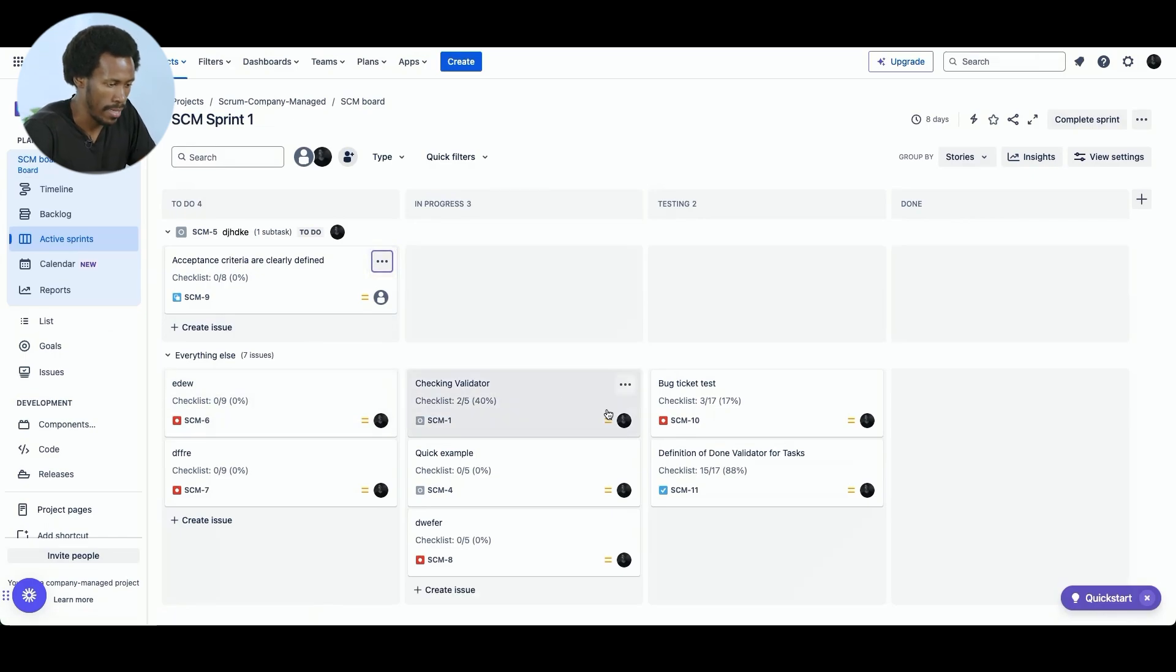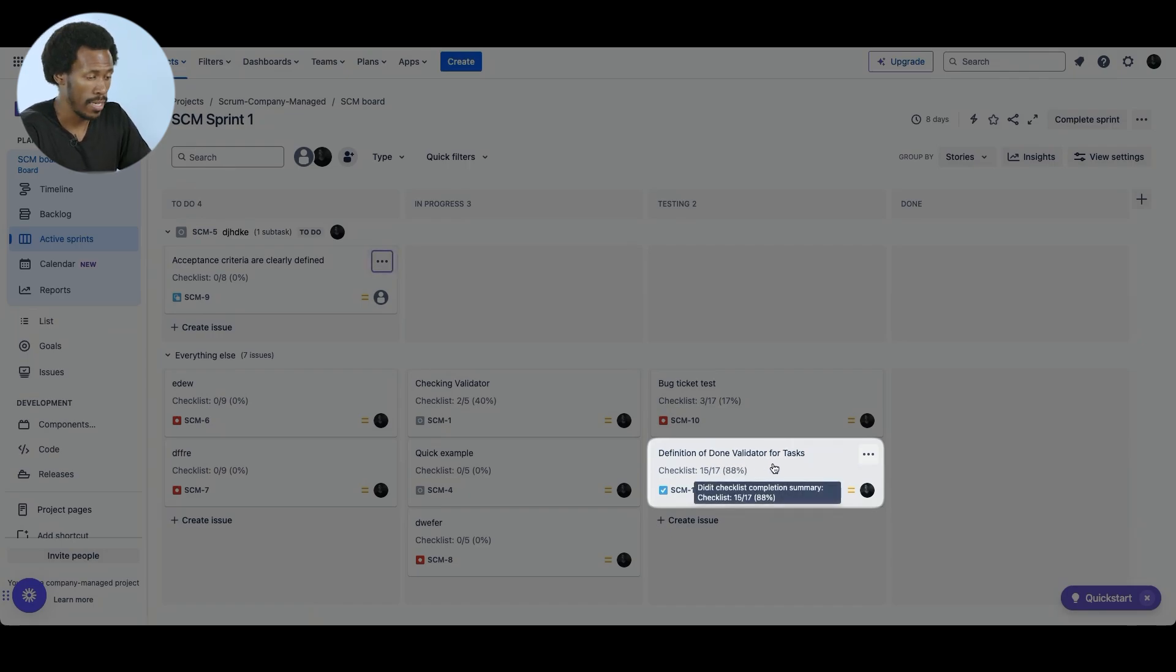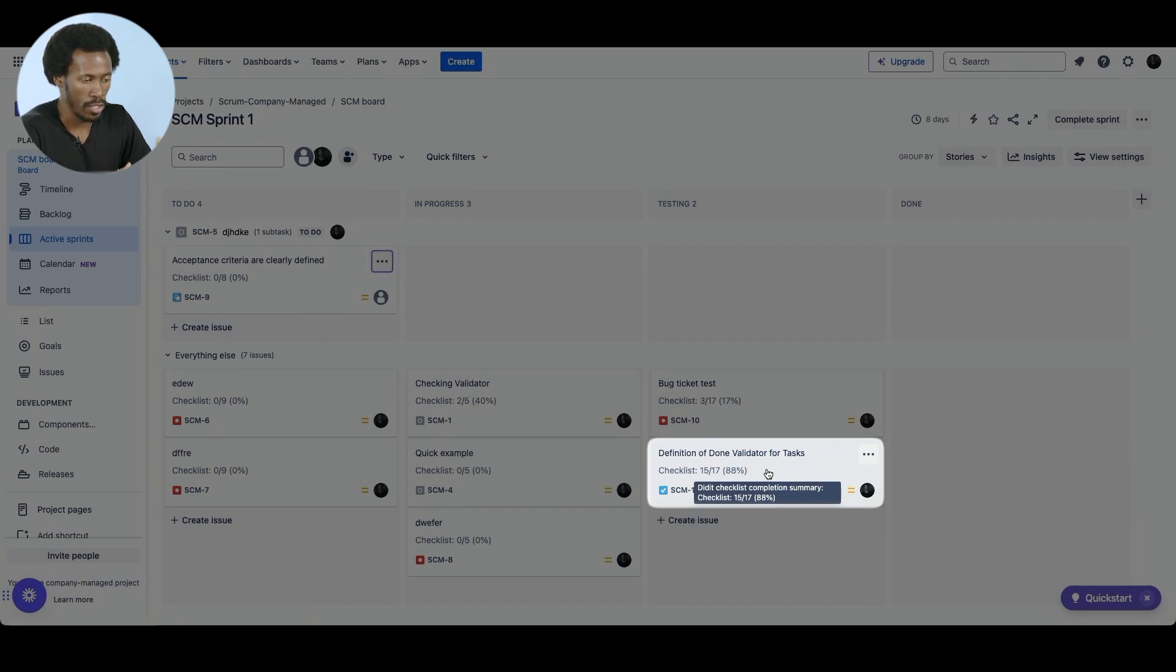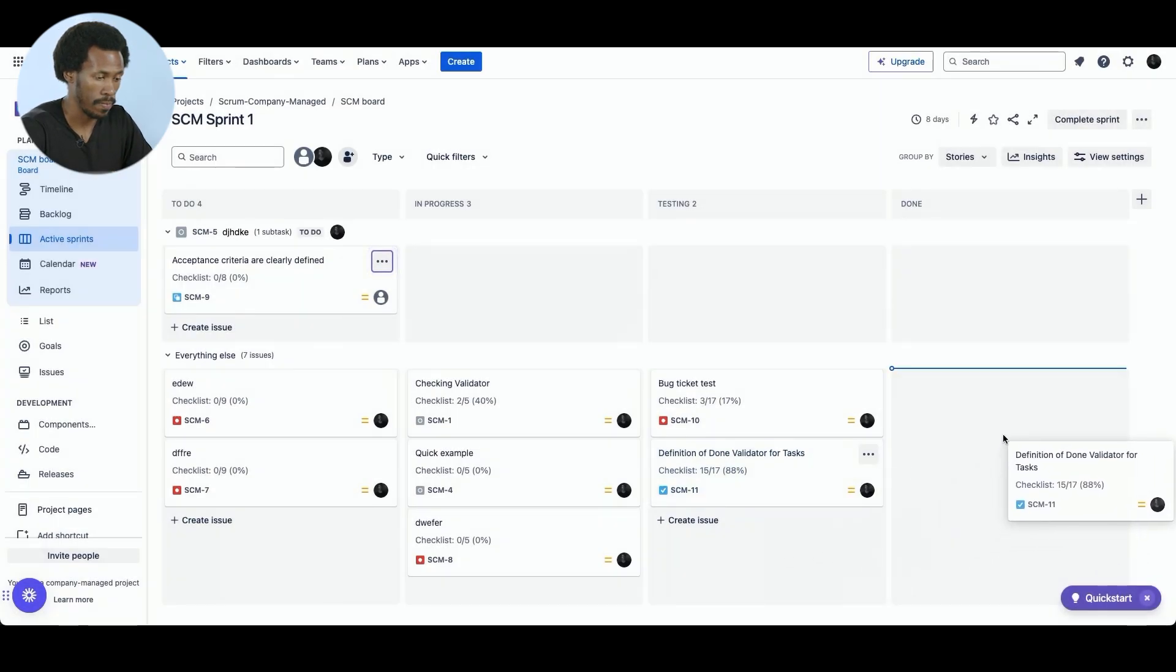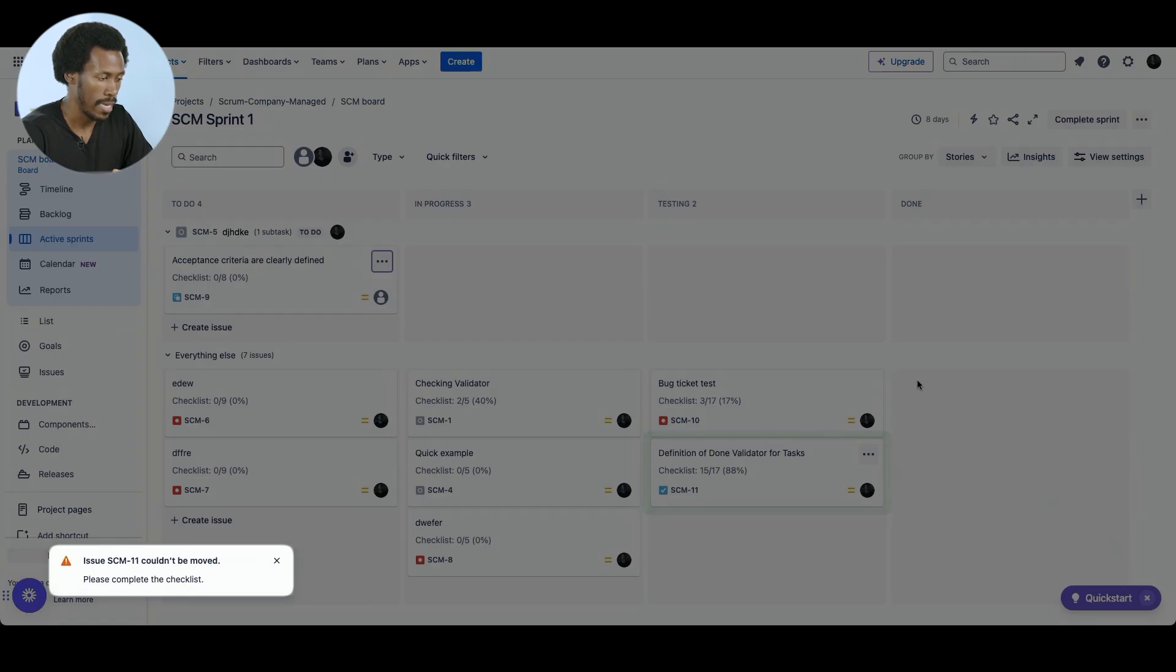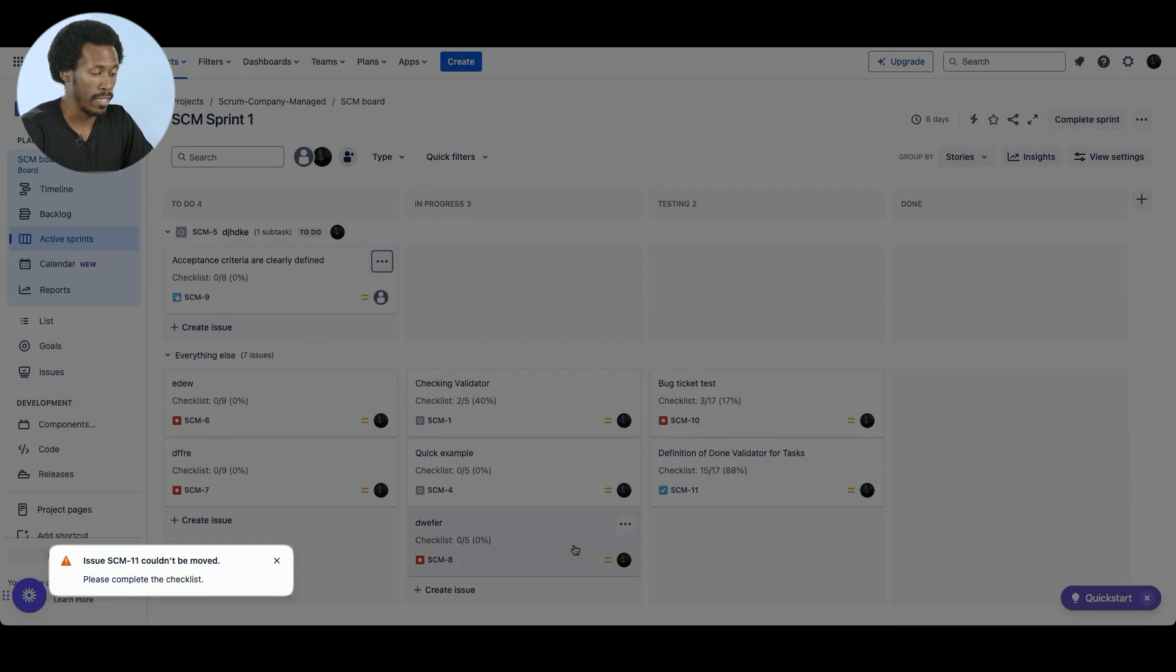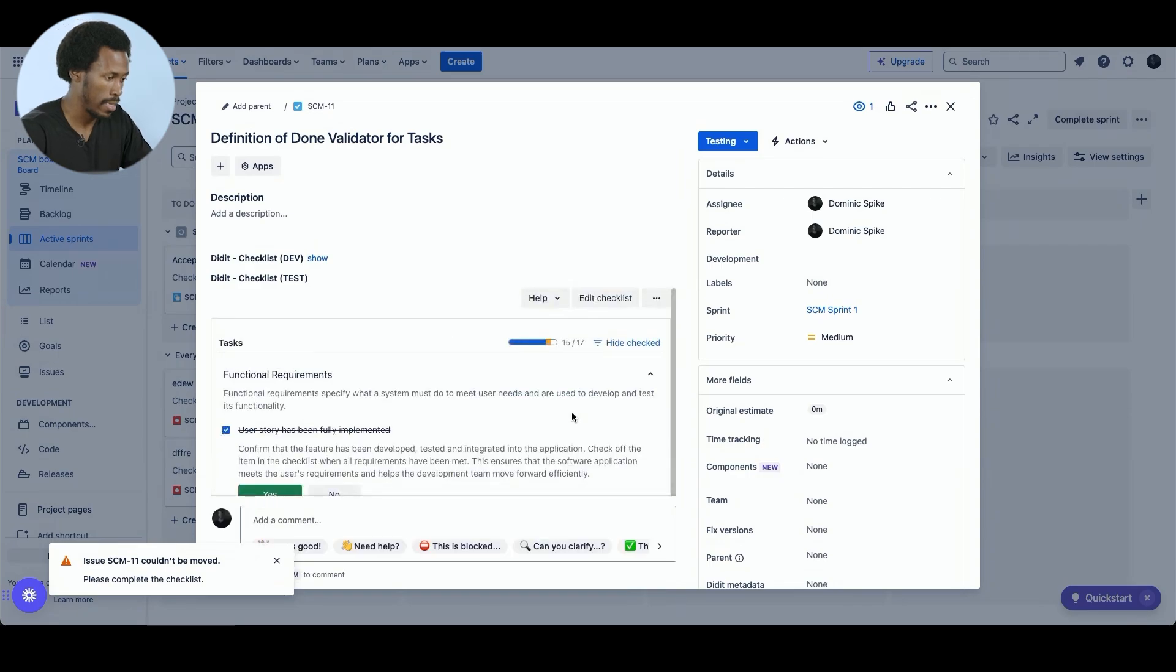And here we are. So let's select a task that we have. So we have definition of done validator for tasks. And we can see that it's on 88%. It's not quite finished. The validator is supposed to work in a way that it will reject this task from being accepted as done. So let's see if this works. I'm going to drag and drop it in the done swim lane. And here we have in the bottom left screen that this cannot be completed.